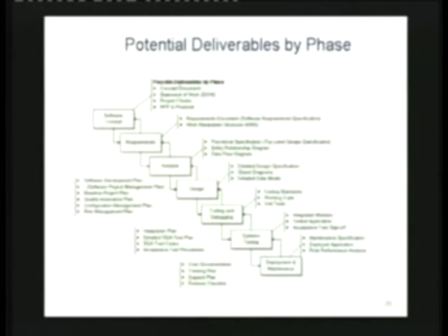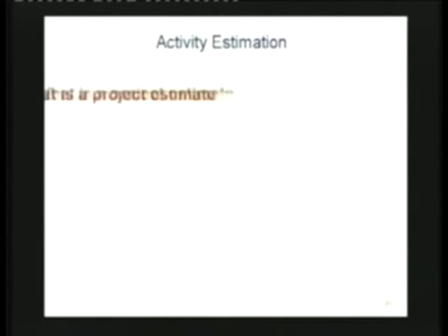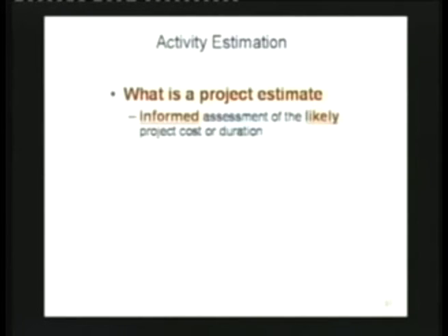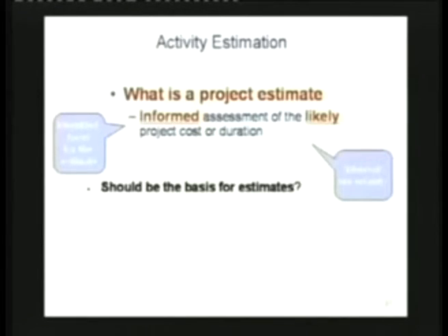The reason for you to get these details is not just bureaucracy. It also gives you the sequence in which things should be done, because the later things are dependent on the things that came before this. If I move this forward, you end up with a network. Because I have to get to this estimation. I've got to get the time estimated, I've got to get the cost estimated. And in order for me to do these things, I must have a basis.